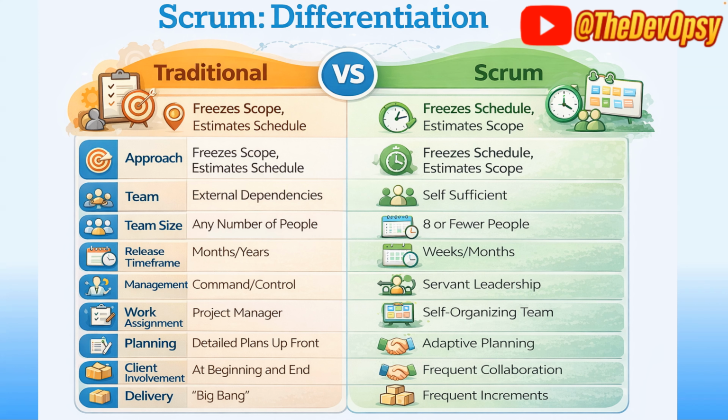It's the opposite. There's a difference. There we were actually getting the scope and then scheduling the timelines. Here we have our timelines first, that okay, within 2 weeks or within 4 weeks we can do this much amount of work. And then we decide this is our scope.